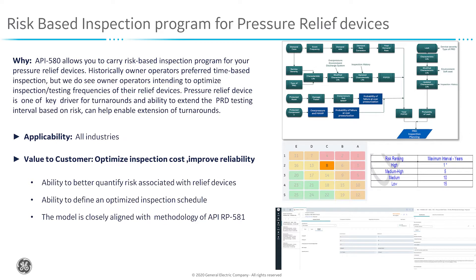Historically, owner-operators do prefer a time-based approach just to make sure that they're not taking too much of a risk, but now we do see owner-operators intending to optimize the inspection or testing frequency of their relief devices. The pressure relief device is one of the key drivers for typical turnarounds, and the ability to extend the PRD testing interval based on a well-defined risk methodology can help enable extension of turnarounds.